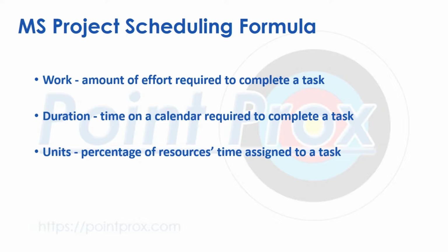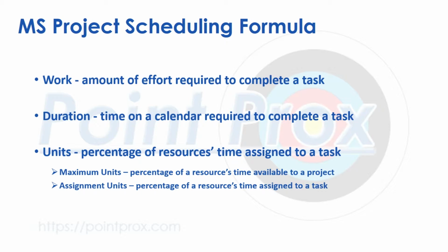There are two refinements to the definition of units that need to be discussed. The first is maximum units, which is the number of a resource's hours available to the project over a period of time. Essentially, it is the percentage of the total working time for the calendar that the resource is assigned to that is available to the project.